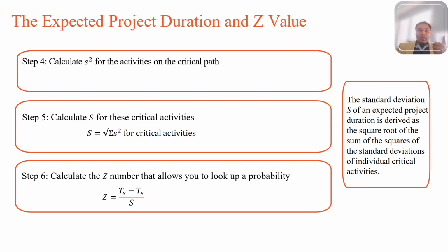Now the z-score tells us whether it's a positive or negative score. If it's a positive score, the data point is above the mean, and for a negative score, the data point is below the mean. And there is also a z of 0, which means the data point is at the mean. Now you need to look at the magnitude of the z-score. A larger absolute value of z-score indicates the data point is further from the mean, meaning it is more unusual or extreme. Once the z-score is calculated, you can use the normal distribution table to find the probability, which is on the next slide.